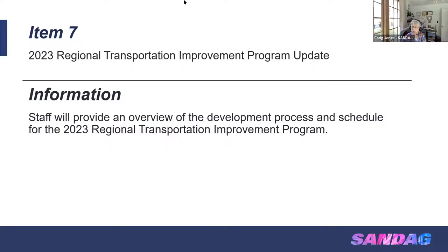Okay, well, as we move along, maybe not in this RTIP, but sooner rather than later, I'd really like to see emphasis on flexible fleets implementation through all means. Thank you. Craig, just wanted to add a little bit to that, to remember that the RTIP is programmed funds and it is updated every 2 years and it's amended every quarter. So it's a very active document.